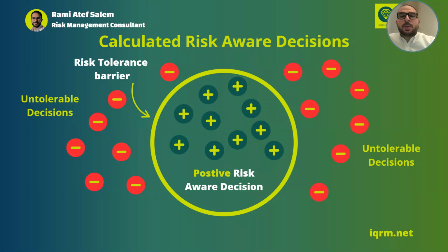For example, you have a shutdown window that you need to catch up with, maybe for a turnaround project, and you are investing in air freight and maybe some premiums. So you want to know if investing in such air freight and premiums is a good decision or a bad decision.